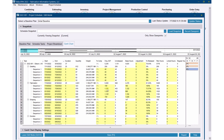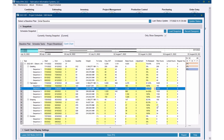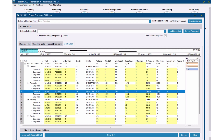Coming down to sequence two, we've got 1,525 original estimated hours and 1,122 base hours. It's going to use the original estimated and assume we have more material to come, because we're not yet up to our original estimated hours. Same deal with sequence three. Sequence four goes the other way — 1,100 estimated, 1,182 base — so it will use 1,182. If these were 100% released, I could change it to 100% and it will use the 1,122 hours, meaning nothing else is coming.